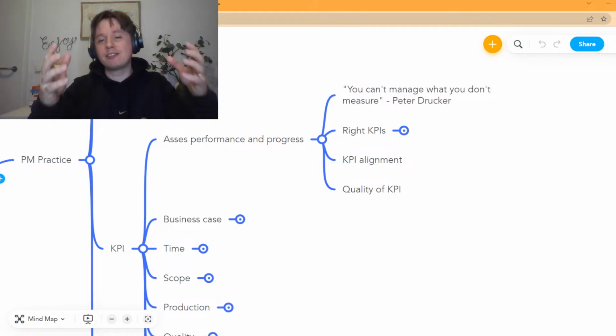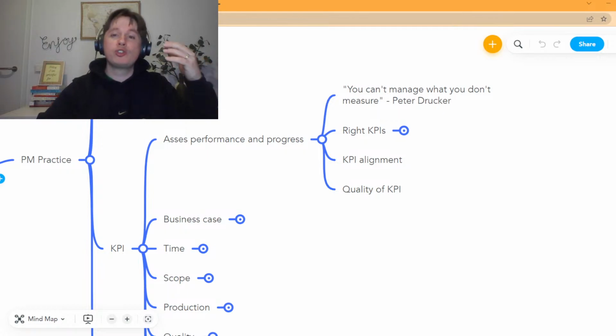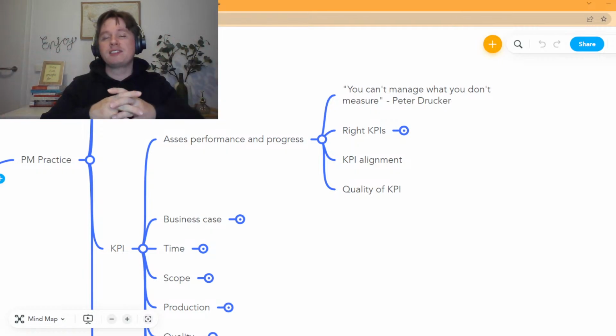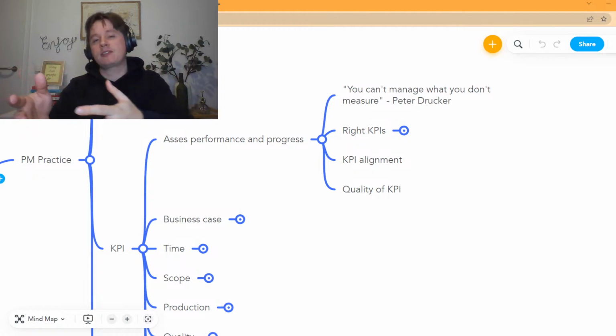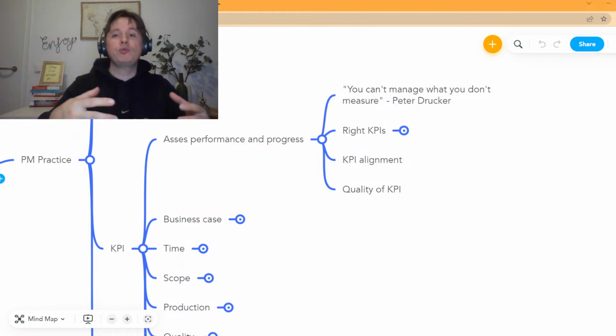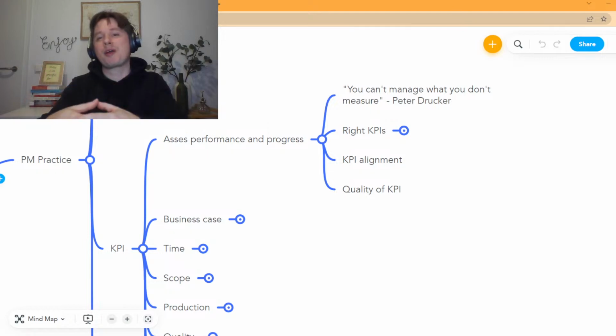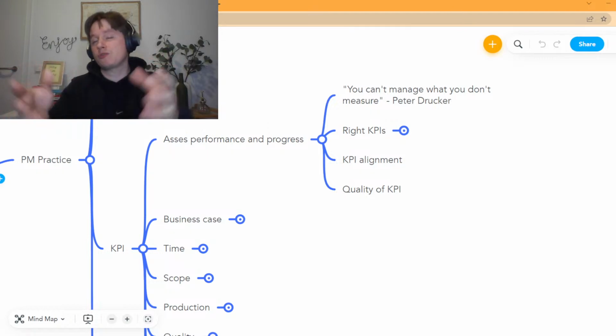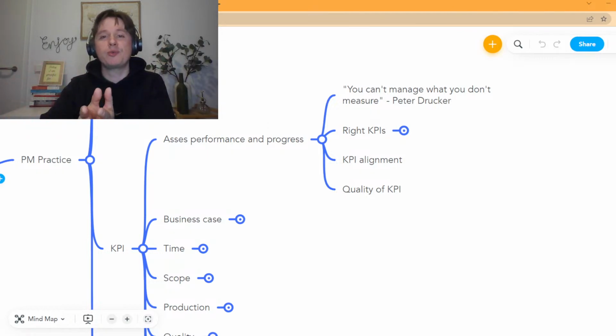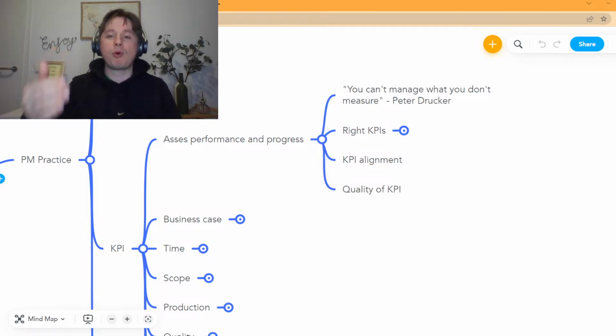So if you have a good quality KPI measurement, you should never see projects that are what they call watermelon. This only exists because of those problems in measuring KPIs. And again, if you take over a watermelon project from someone else, for a peer or whatever happens, and you end up being responsible for a project in that situation, the first step that you should take is reporting the project's correct status.